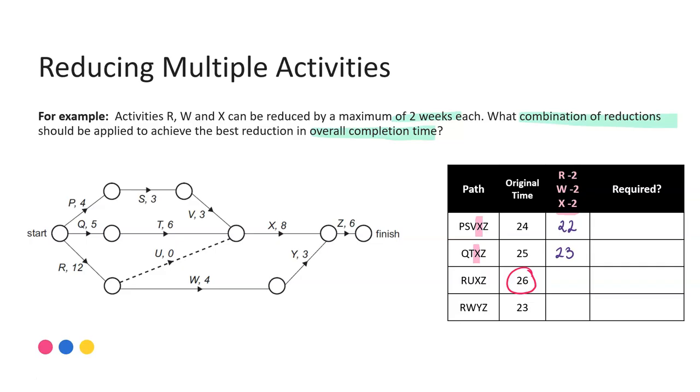For the third pathway I have an R and I have an X. So I have two activities which both can be reduced by two. That means a total of four weeks can be saved. So here 26 minus 4 would bring that completion time down to 22. And then finally the fourth path I have an R and a W, so again two activities can be reduced by two weeks each. So a total of four weeks off the original bringing that time now down to 19. So we've applied all of the possible reductions that were made available to us. And that's the important step when you're reducing multiple activities.